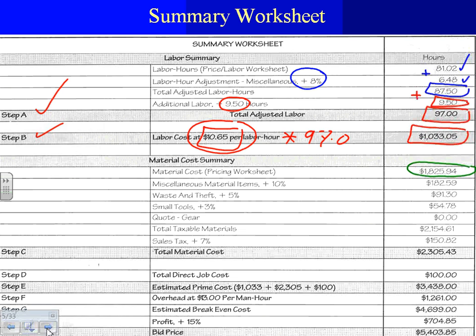Okay, more details. Where do you think this number came from? That's from the detailed takeoff and labor and pricing. This number is carried from the material cost pricing worksheets. There are multiple worksheets; added them all up, all the receptacles, all the lights, everything else, adds up to this number. So that's your total price for the whole project that you took off. That's the sheets that we had before, where we said we'll take them off, add price to them, extend them, total them, and you end up with this number.